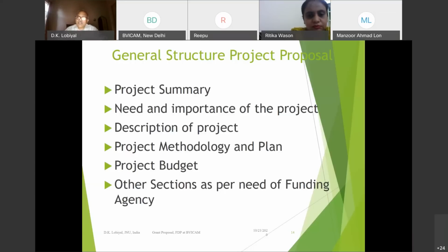Therefore, your budget must be linked with your manpower requirement as well as your equipment, and you must have a justification for that. If you just say, give me four people, give me this much money, it is not being distributed. Whatever you need, you will get it, but until it's justified, you will not. I'll talk in detail of everything.